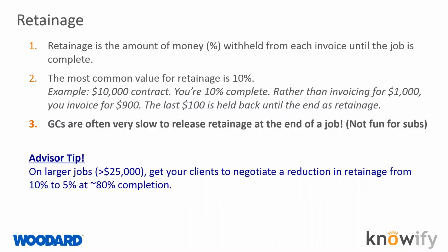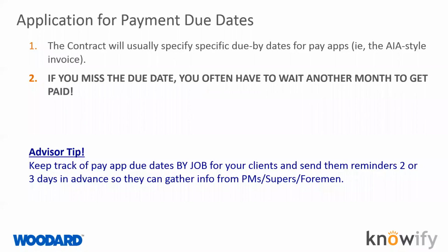And what it does is it means that there's half as much retainage to release at the end of the job. And obviously, when you're not yet finished, the GC wants you to keep going. So they'll typically pay you quite quickly on that one. So they'll pay you according to the normal payment cycle. And it really does make a nice difference in the cash flow of these contractors. So that's a good advisor tip, definitely one worth writing down.